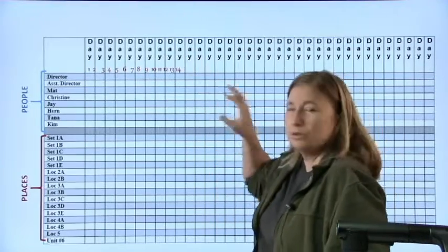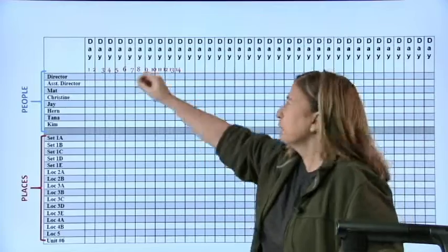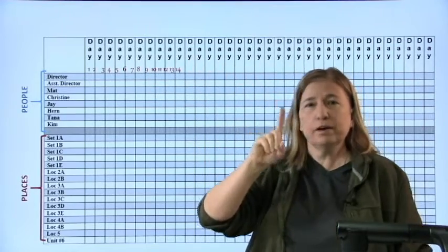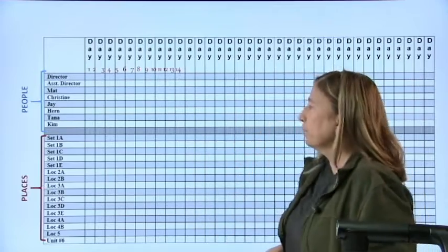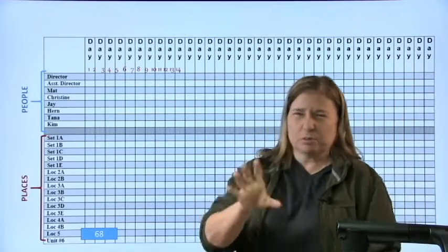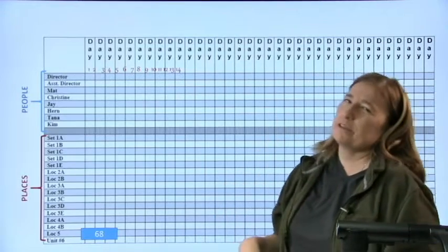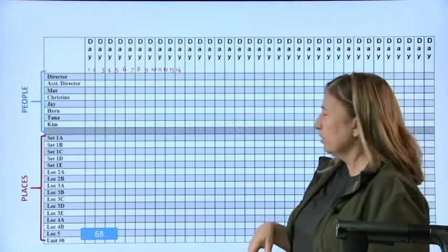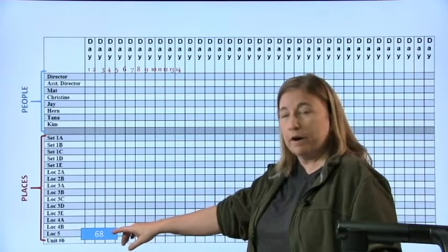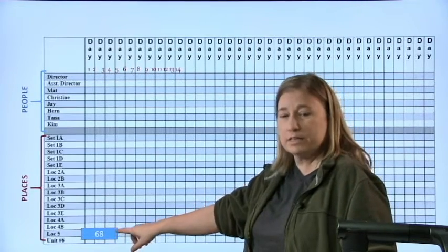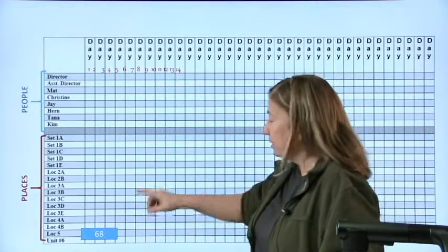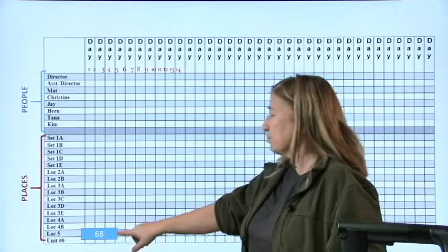Oh, right, you downloaded, there's no numbers up here. One of the first things that you would do is that you would create the number line starting on day 1, day 2, day 3, day 4. Let's say that I'm Robert Altman, right? I said that was one of the famous directors that likes to do everything in the order of the plot. We had noted that that means you're going to have to prep location 5 right away. That is task 68. That doesn't take any people, right? But it does take location 5. I just made a decision.